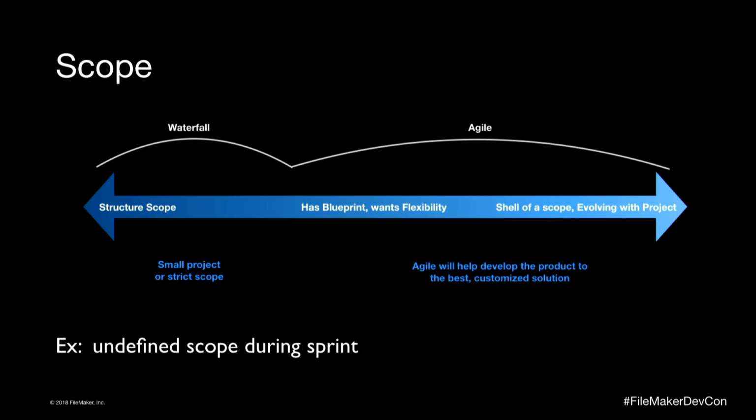So anytime in any of these factors that we're considering, if you're having to stop, whether it's to get a requirement or to get more funding, etc., you've stopped and become waterfall. So that should be a key takeaway for you. If you're in a project right now and you're not quite understanding why it's not running well in Agile, it's because you're stopping and you're halting the process. So you should consider whether it might be better for you to move into waterfall.